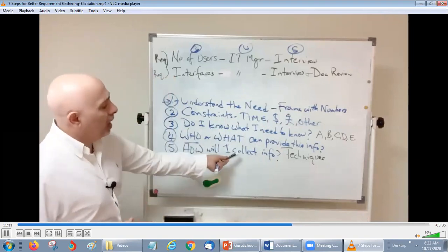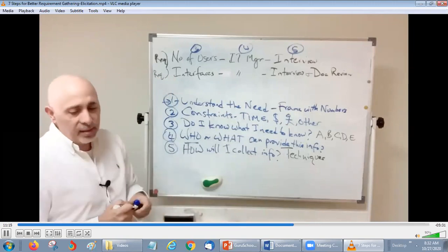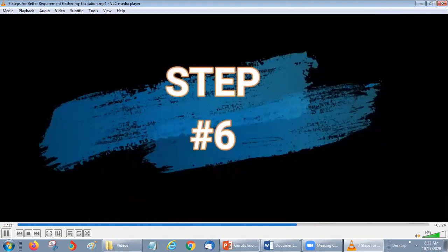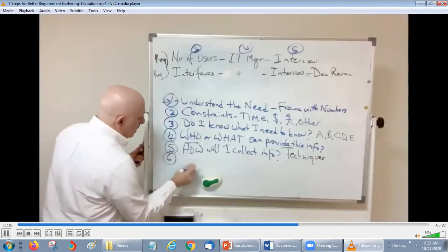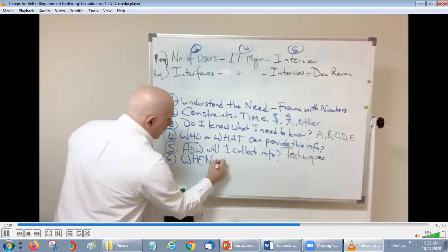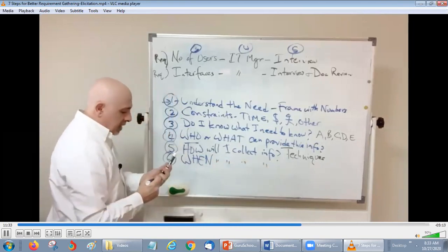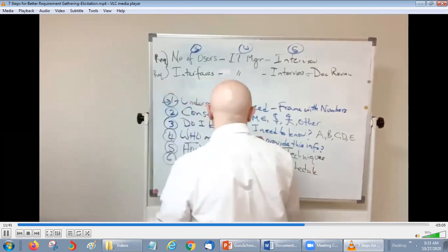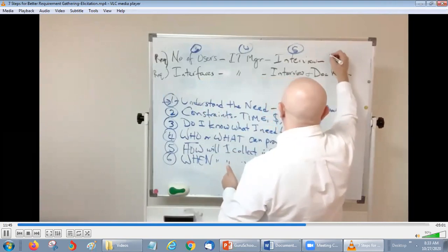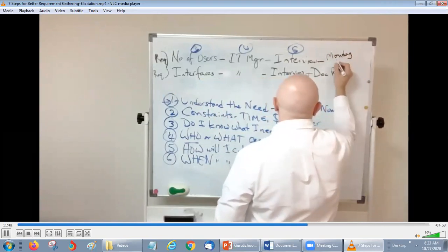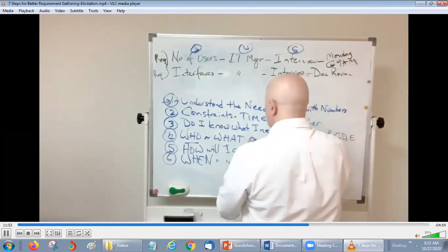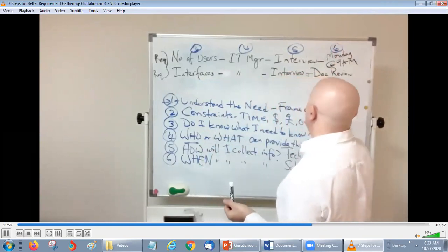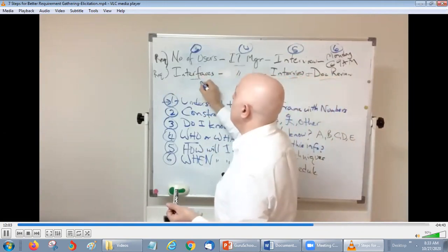All right, so figure out how you're going to collect this information using the techniques, and then once you've figured out all the techniques that you want to use, now go to step number 6, which is: when will I collect info? And that would be your schedule. So you're going to develop some sort of a schedule, and you can just put that at the top here. So if I want to figure here that, let's say, I plan for Monday at 9 a.m., that's step number 6 for me. I figured Monday at 9 a.m. I'm going to do an interview and review some documents with the IT manager to understand these key points.